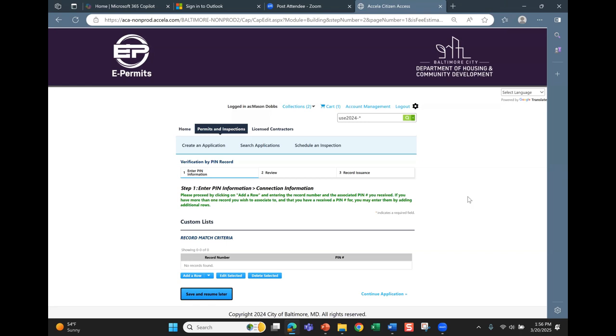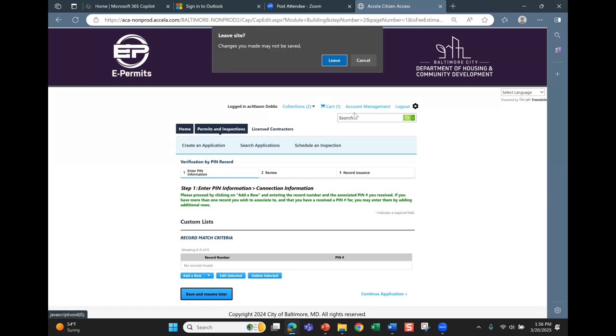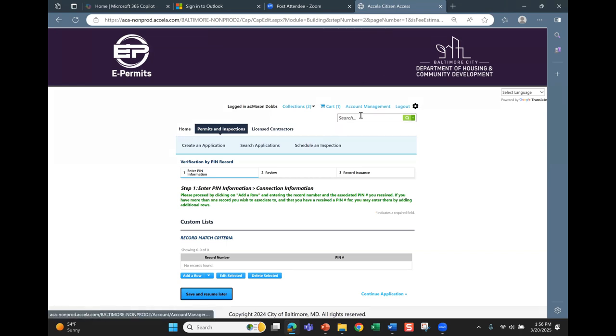I'm trying to do a permit extension and I get to the step where it says... I'm going through your guide. It just didn't tell me the difference between extension and reinstatement. This permit expired a year ago. I put the expiration date in there and it says extension type. So I know it's an extension, but I don't know if I need to do a reinstatement because it's been past the expiration date. Okay, so extensions, you can only do extensions up to 90 days after permit expires.